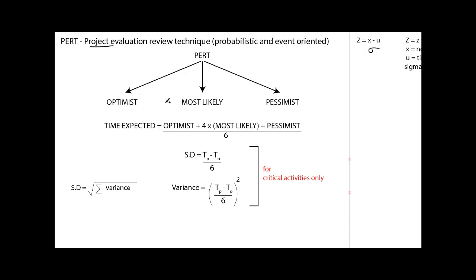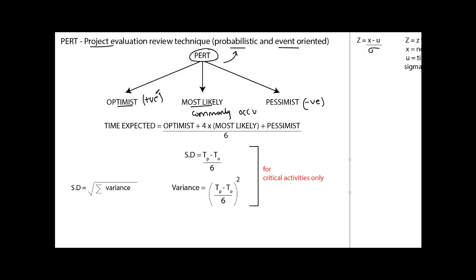Let's start with PERT, which stands for Project Evaluation Review Technique. PERT is a probabilistic and event-oriented model, while CPM is deterministic and activity-oriented. PERT depends on three time estimates: optimistic time (the positive/best-case time), most likely time (the commonly occurring time), and pessimistic time (the negative/worst-case time). The expected time formula is TE = (optimistic + 4 × most likely + pessimistic) / 6.